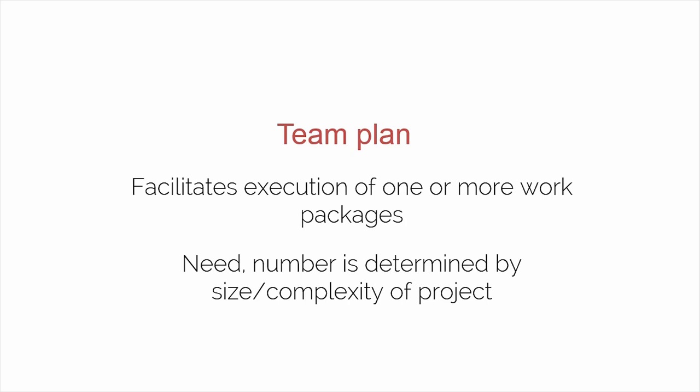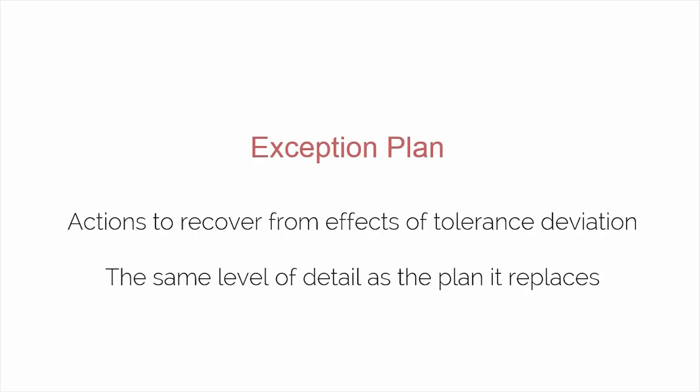The team plan is produced by a team manager to facilitate the execution of one or more work packages. The need and the number of work packages are determined by the size and complexity of the project. PRINCE2 does not prescribe any particular format or composition for the team plan. PRINCE2 has another type of plan called an exception plan.